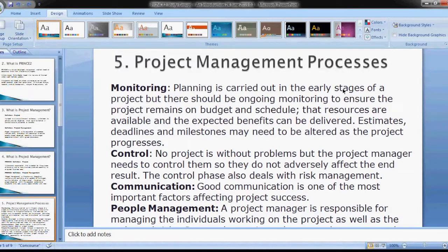So which means that if you have been given a date, so you told the builder to make sure you deliver the pillars and make sure that you deliver the cement on the 5th of January, knowing that you're going to start the building of the house on the 20th of January 2017. If the builder does not supply the materials that you need on time, it means that your date is going to shift to the right.